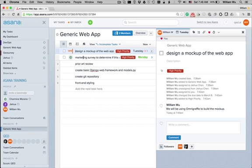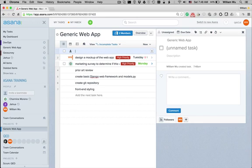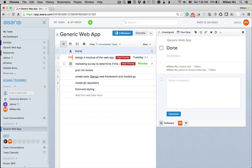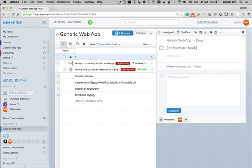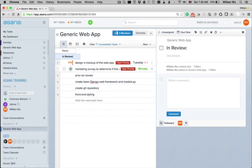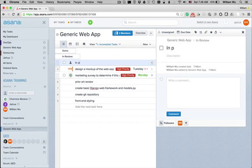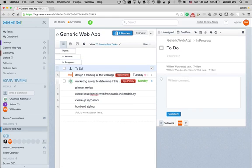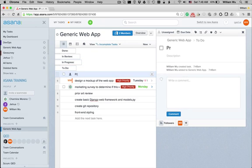So, to do that, we use sections to simulate the Kanban style that you might find in other applications like Trello. So, we typically use five different tags: first one is done, in review, in progress, to do, and proposed.